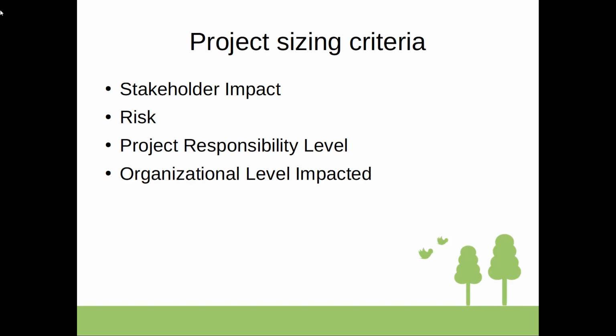It can be a level of impact, as you mentioned. Level of impact means that even the smallest project with the smallest budget can have a huge, drastic effect across the whole company or industry. Again, it can basically be a large project, even though it's not a very high budget project. So in the end, it's indeed a very personal decision, depending on conditions. Most often, in the most common sense, it's the amount of money spent on this project.